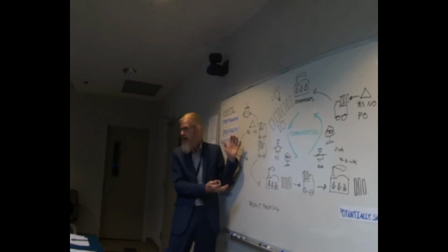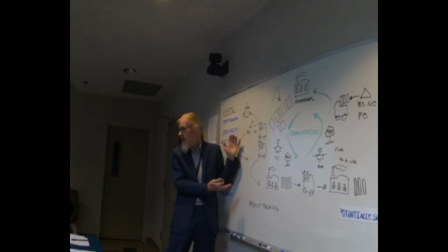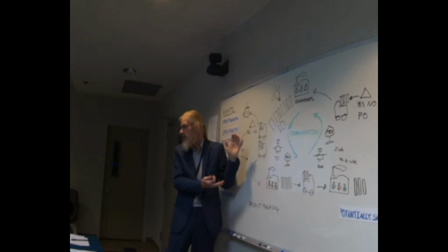It changes over time. And this is one of the things that I've recognized as significantly different between Waterfall and Agile. Waterfall assumes the backlog is healthy because they do all of their analysis based on the backlog as it is up front. Agile assumes that it's got some issues, that maybe people didn't write the stories correctly, or their requirements, or they didn't realize, or technology is going to change in the middle.